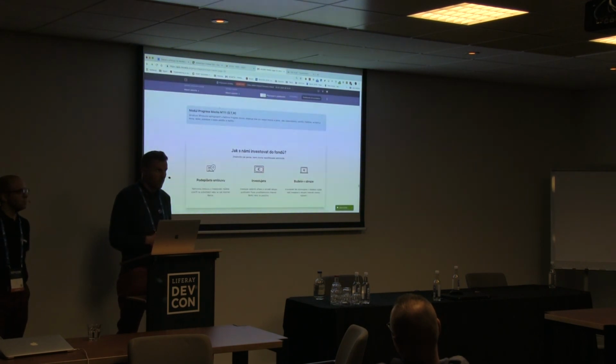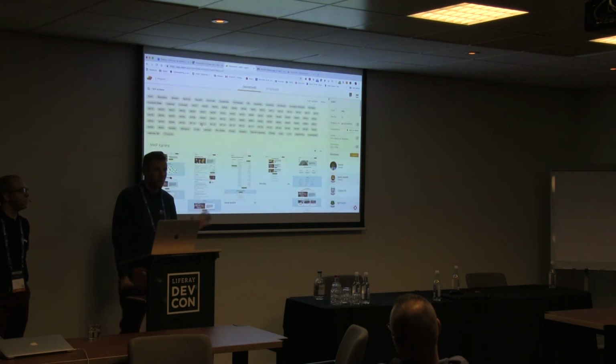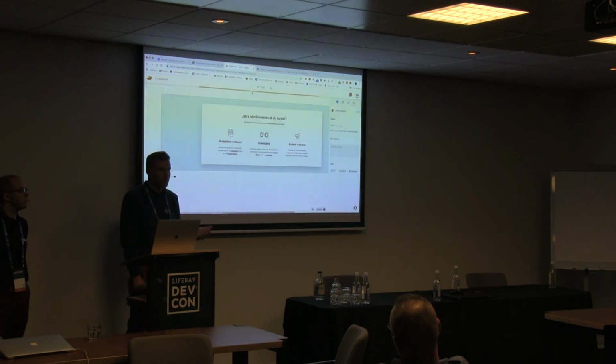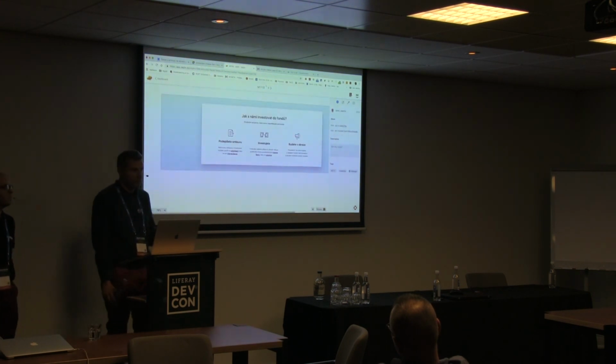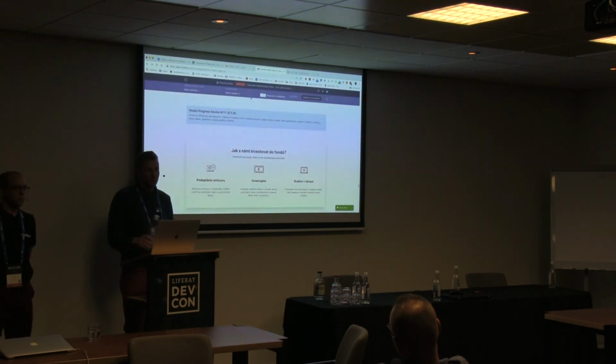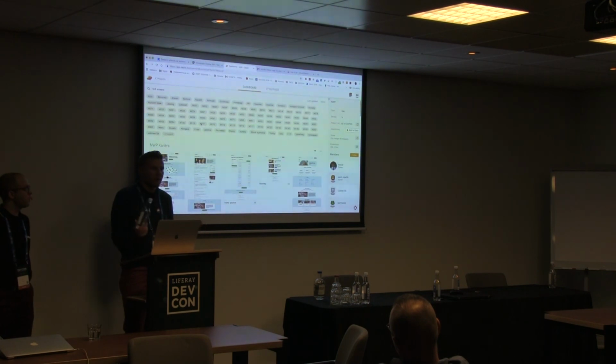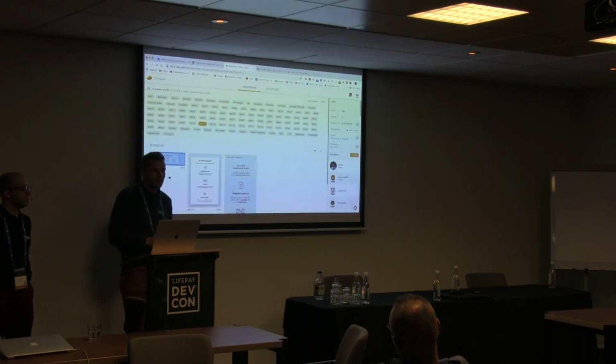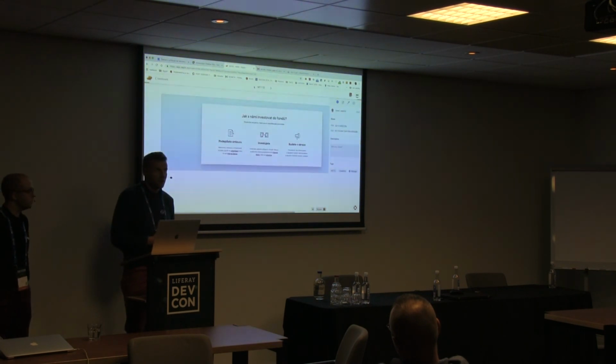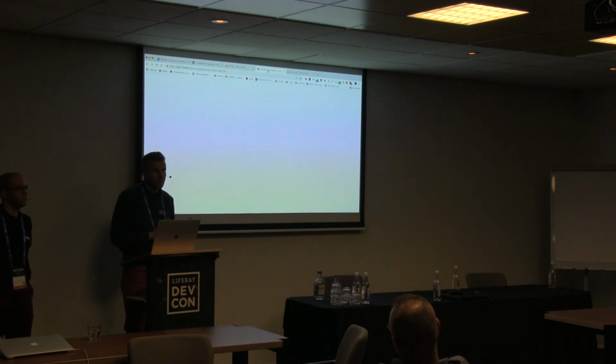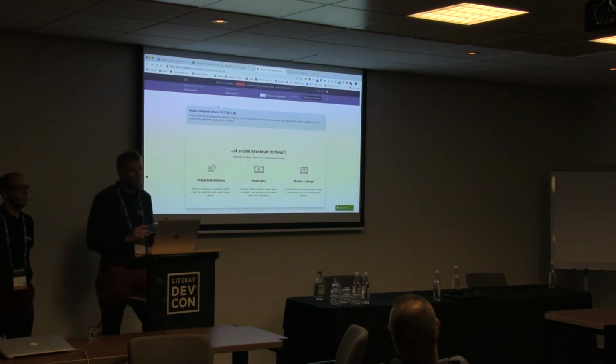Let's say that during the last phase, where we actually changed the approach, we had 4 months for around 6 user stories. So less than a month for one user story, which also usually contains a calculator, like 2 formulas or something like that. But the user stories become easier to deliver because the number of modules you already have just grows. Usually it's 2 user stories per month maximum. Did I answer your question?